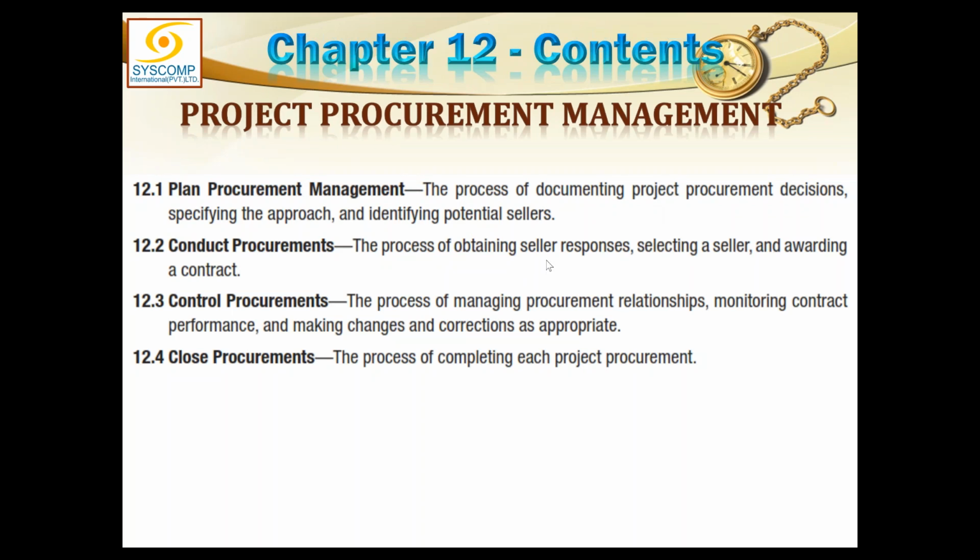So as we were talking, plan procurement is the process of documenting project procurement decisions, that was the make or buy decision, specifying the approach and identifying the potential sellers. Conduct procurements is the process of obtaining seller responses, that is the bids, selecting the seller and awarding a contract. So by the time we award the contract, we are done with our execution job. Conduct procurements happens in the execution process group.